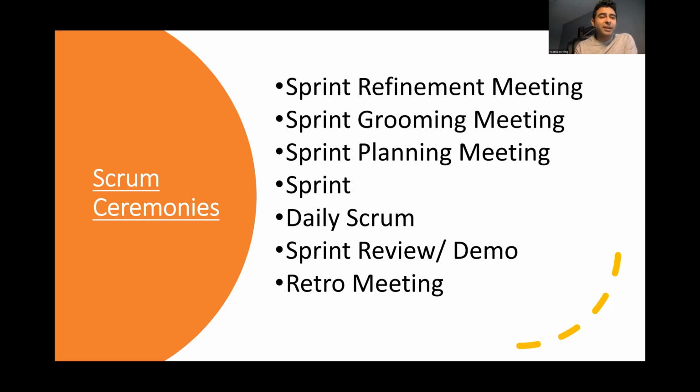Basically, we need to bring around 21. If you can bring exactly 21, awesome. But if you can bring 20, 21, 22, 23, we try to bring those user stories into the sprint. So in the planning session, we bring those user stories and assign them to the developers. So when the sprint starts, every developer knows which user stories they are working on.